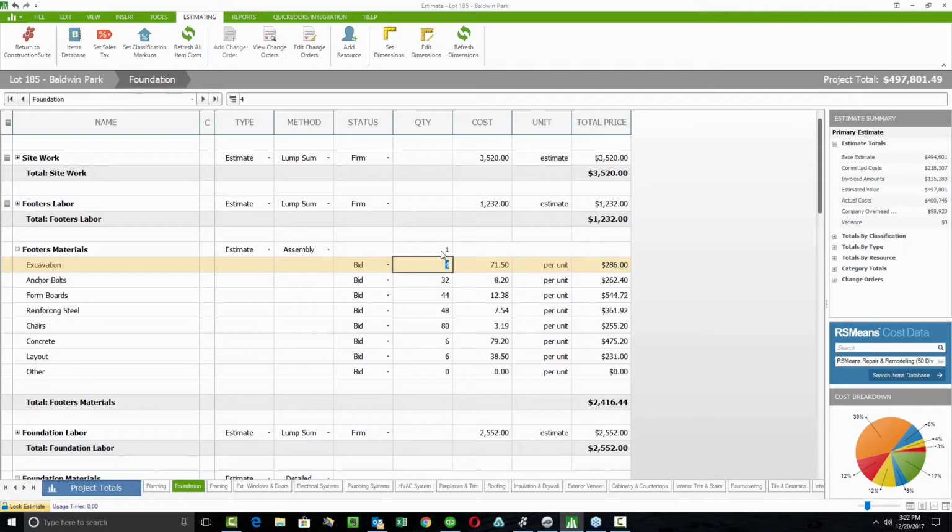Because he set up these assemblies and because he's got all the pricing information available within one of those cost books, he opens up the estimate, he refreshes the item costs, and then all he has to do is go through and assign the assemblies for each of these major pieces. How many windows are we using? How many bathrooms are in the house? How many square feet are in this house? And how much of that's got to be carpeted versus hardwood floors versus, maybe we're putting in trim and paint and all these things. Each of those could be assigned as an assembly.